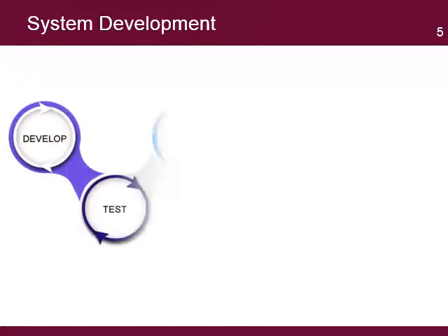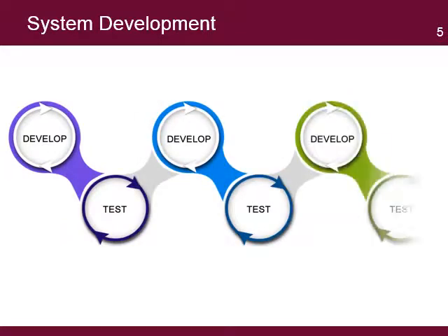It is good practice to break this phase into smaller steps. Each step should deliver a functional component of the system that can be tested and approved by the users of the system. This allows for small iterations in the development, which facilitates the discovery of errors, oversights, and identification of improvements, and even new functionality that must be included in the system.